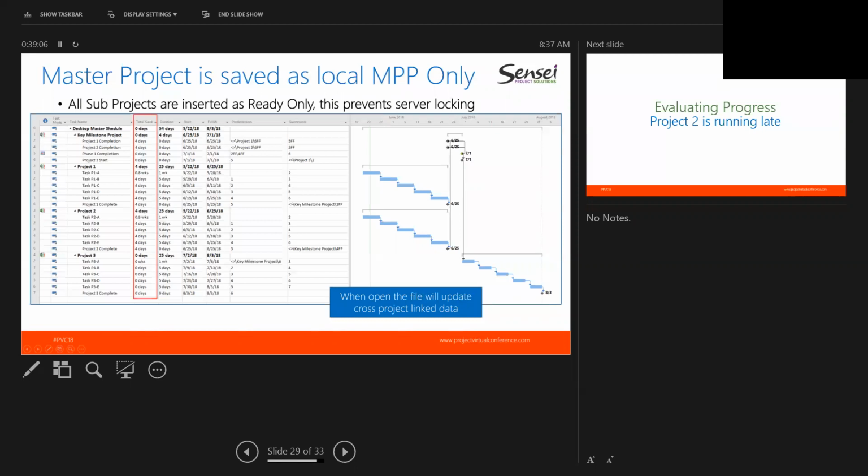But instead of having projects 1 and 2 be predecessors to project 3, their links go up to the key milestone, and project 3 gets its link back from the key milestone. Again, this is the concept that project 3 is not linked to 1 and 2. Project 3 only has one link up here to the key milestone, and these projects are linked up again to the key milestone 2.